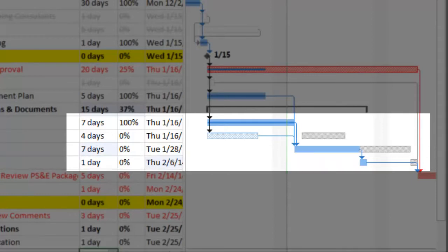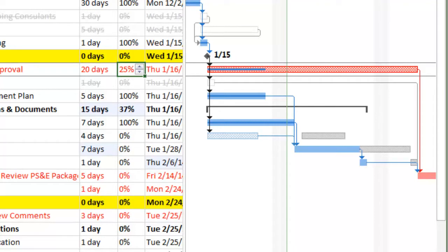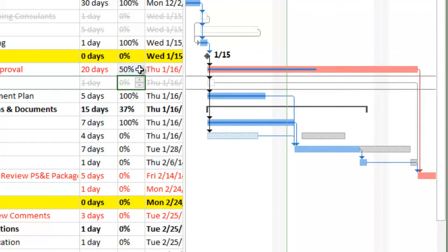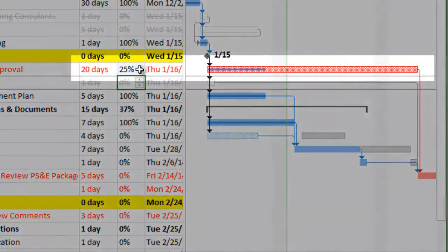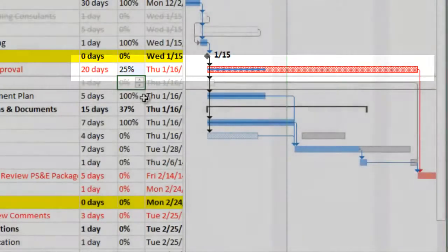The third enhancement allows for the quick identification of all late tasks, critical and non-critical. Now, when a task is late, the fill will change from solid to hashed. The color will, however, remain the same, meaning non-critical tasks will still be blue and critical tasks will still be red. Late tasks, especially late critical path tasks, can delay the project and should be researched and resolved.